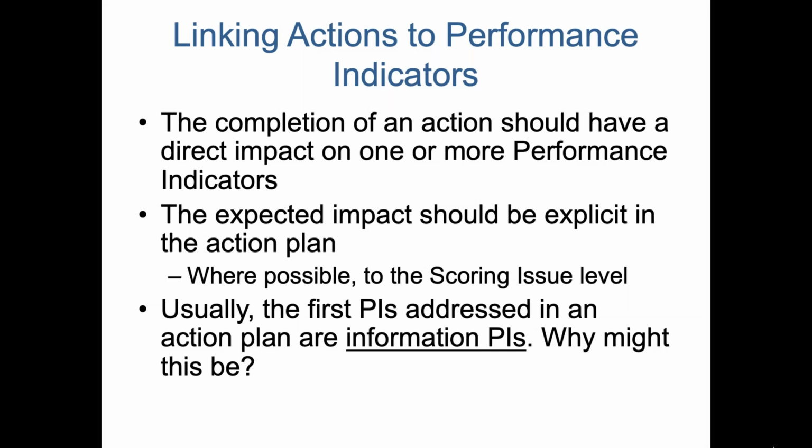This is, again, a little bit of guidance in trying to break down what needs to be done to address gaps in a fishery or to improve the fishery. Oftentimes, those gaps are identified across the standard in a lot of different places, but many of those gaps are linked to a lack of information. So you may have a sub 60 score in your pre-assessment for information and for outcome and for management in a particular component. If you develop the action plan to address the deficiencies in information first, that oftentimes has knock-on effects in the other components of the assessment, because once you gather the data, suddenly you understand a bit more about what the impact of the fishery is, for example, or what the status of the species is, and then that can improve the outcome for that indicator as well.